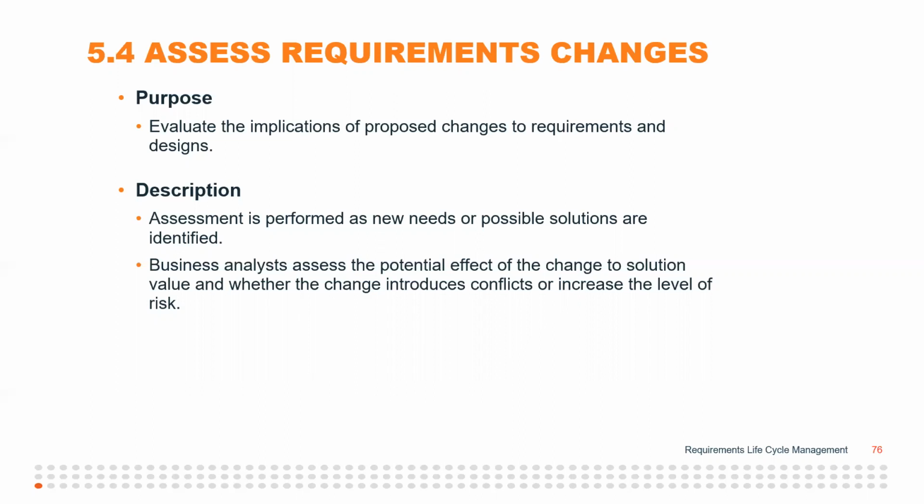Absolutely. Now that's really going to be your job, is to track those changes, and if your organization does use a change request form or that, then make sure that each one of those is documented. Whether there's a formal form for it or not, you want to document where the change is coming from, who's requesting it, and probably do an impact analysis on what does this change mean. So anyway, yeah, you got to do it.